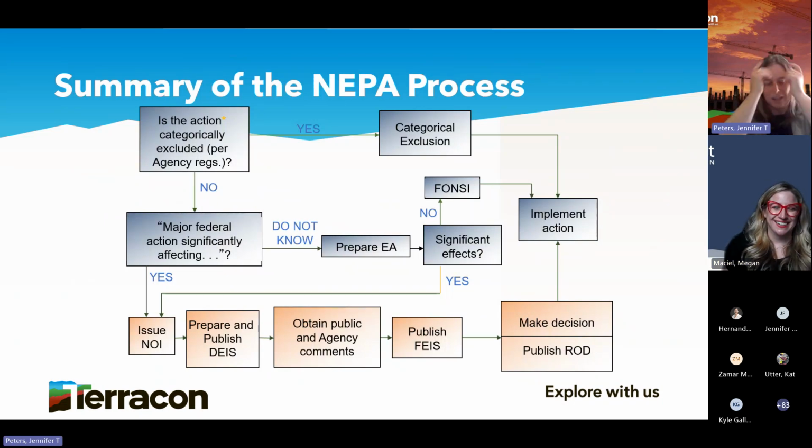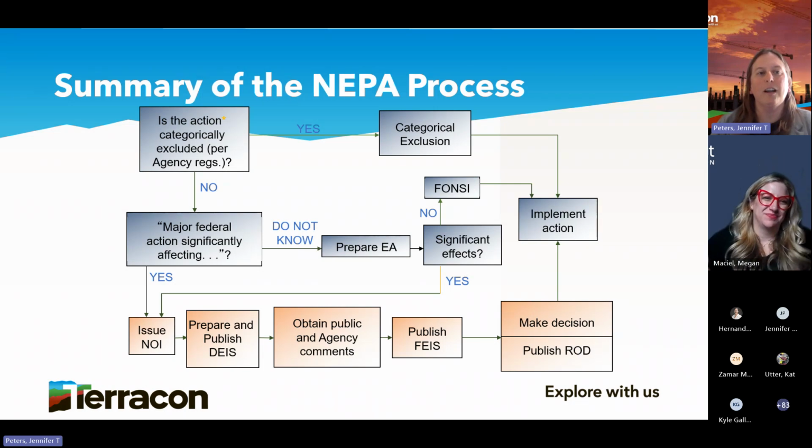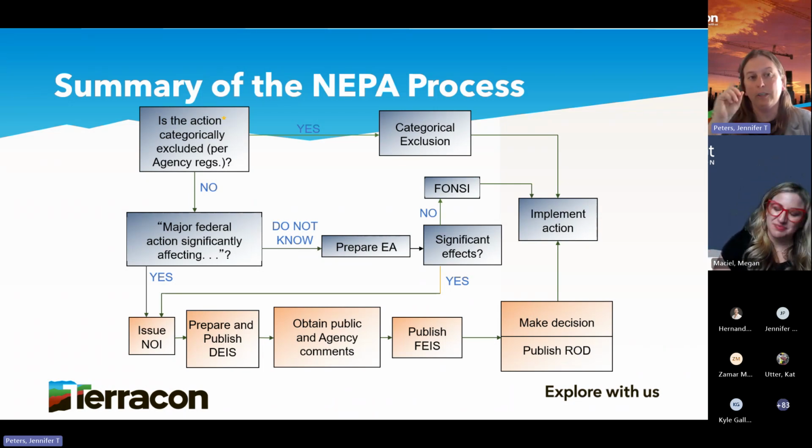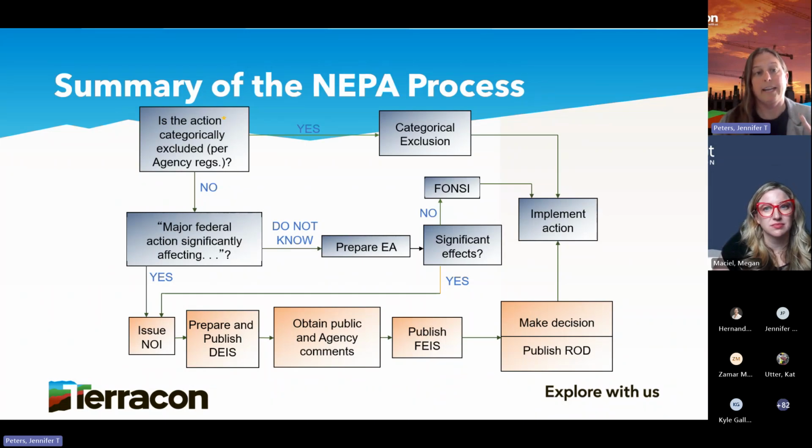Okay, so actually there's a project in Louisiana, Kyle, that we're working with multiple agencies on. We had informal conversations. You can only have one lead agency. You no longer have co-leads. You no longer have multiple agencies kind of thrown in. We had a conversation with them earlier in the year. Everyone talked about, well, I'm going to be the lead, but I can't do this until we have a letter signed. Five months later, we finally got a letter signed from the lead agency.